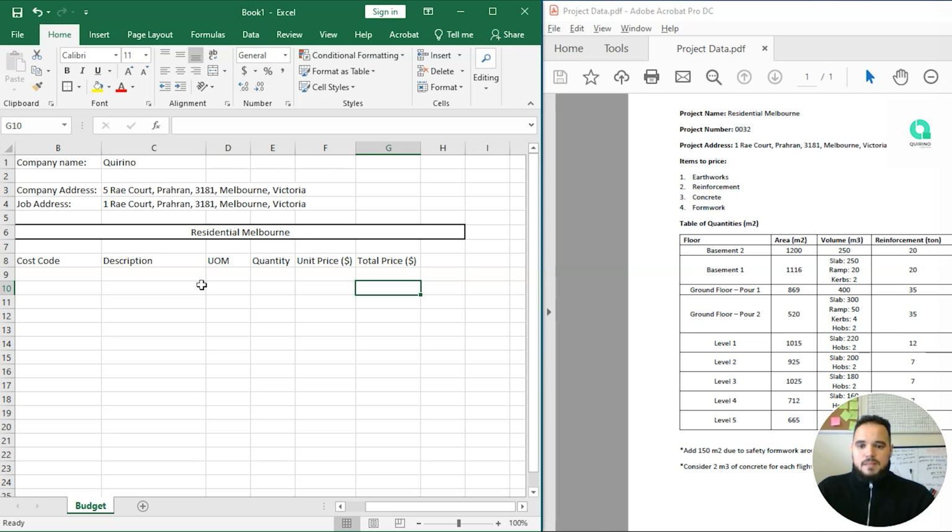However, if they don't have a pricing list and you are doing quotations, then you need to call the suppliers and send them the package and price each item. In this case we already have everything that we need to price, and let's assume that you coded everybody and you have the prices. So I will show you how to price based on this idea.